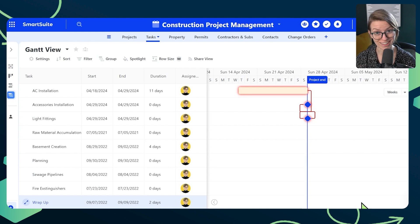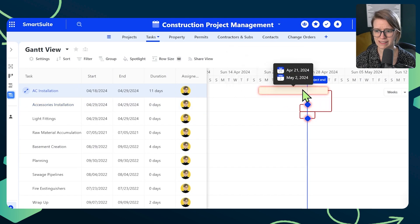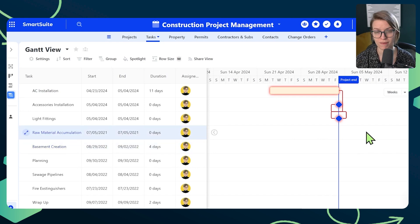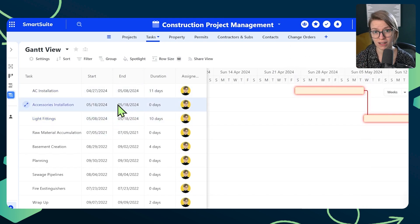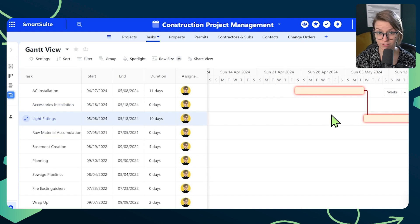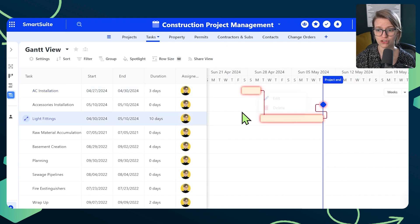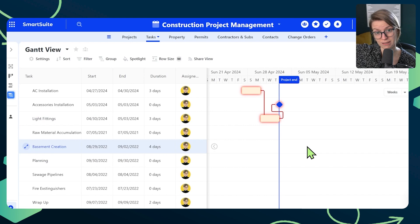As someone who's doing a home remodel project right now, that is the nature of most construction projects. So if our AC installation is running behind — the contractors can't come and have to come a few days later — we move that back, and SmartSuite will automatically move the rest of the tasks backwards as well. Everything connected and blocked by that dependency will be adjusted. This can also work the opposite direction: if your AC installation happens super fast, you can drag that back and everything else moves forward with it.